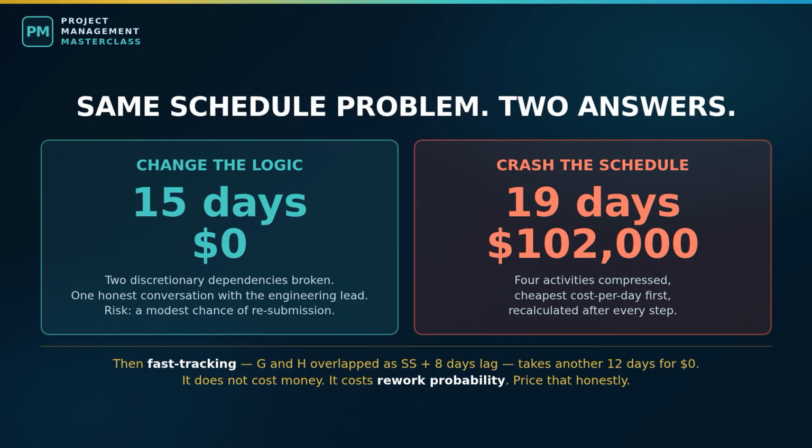And finally, the thing that is not a technique. Cutting the number without cutting the work. Telling the boring crew that 45 days is now 32 days, with no change to scope, resources, sequence, or method, is not compression. It is a wish written in a project management tool, and everybody in the room knows it.